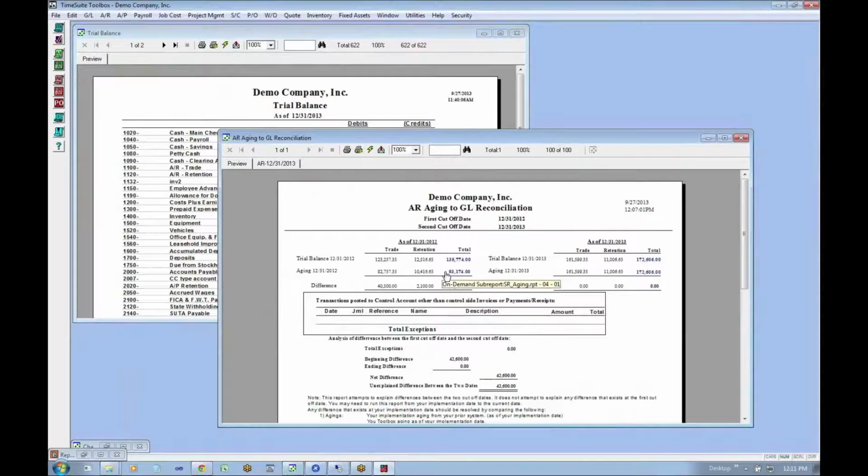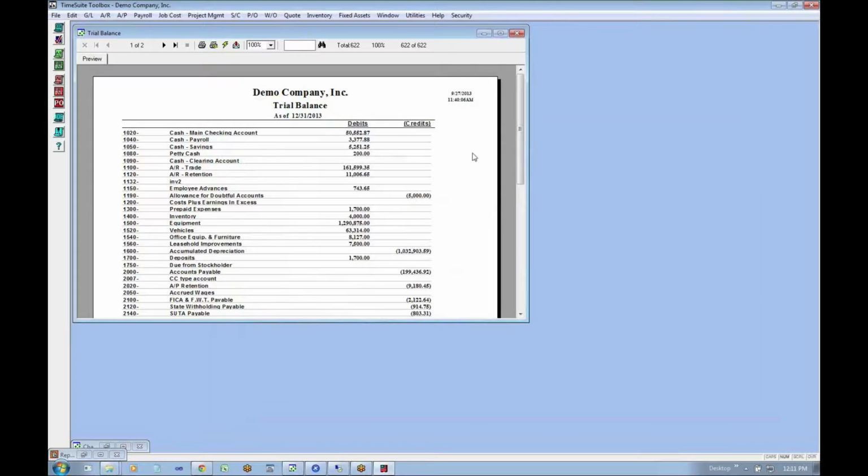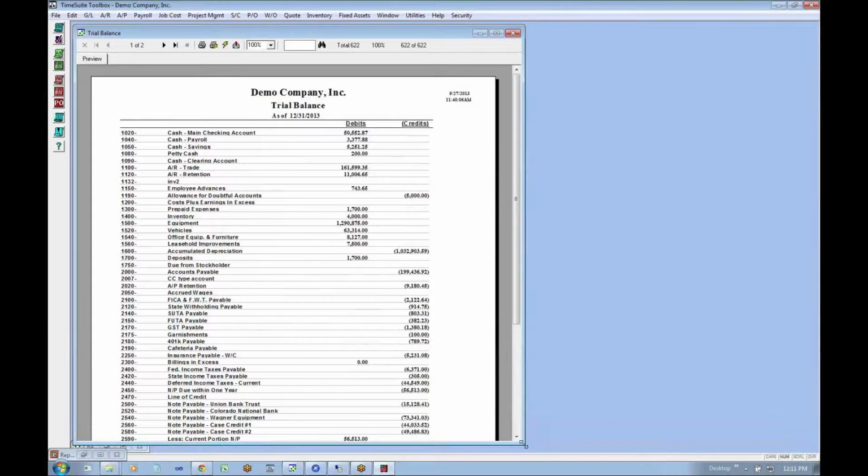But the percentage completion method of accounting is GAAP accounting. If you follow the rules, you can use the completed contract method for your financial statements and be considered GAAP as long as it's not materially different than the percentage completion method. But if you're going that far to even know the difference, you should just present it on a percentage completion method of accounting, I would think.